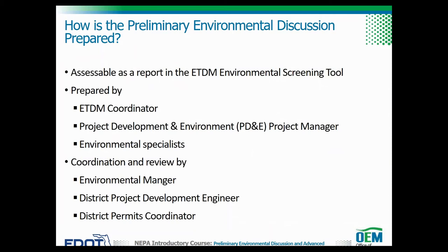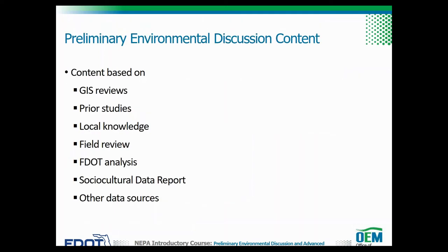How is the PED prepared? The PED is prepared in a report in the ETDM EST by the ETDM coordinator, PD&E project manager, or environmental specialist. When developing the information for a PED, subject area specialists, such as the environmental manager, district project development engineer, or district permits coordinator, should be consulted and given the opportunity to review the information.